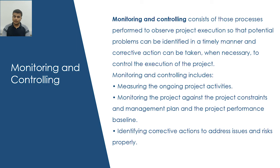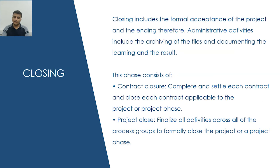The fourth step is monitoring and controlling. Monitoring and controlling consists of those processes performed to observe project execution so that potential problems can be identified in a timely manner and corrective action can be taken when necessary to control the execution of the project. This includes measuring the ongoing project activities, monitoring the project against the project constraints, management plan and performance baseline, and identifying corrective actions to address issues and risks properly.